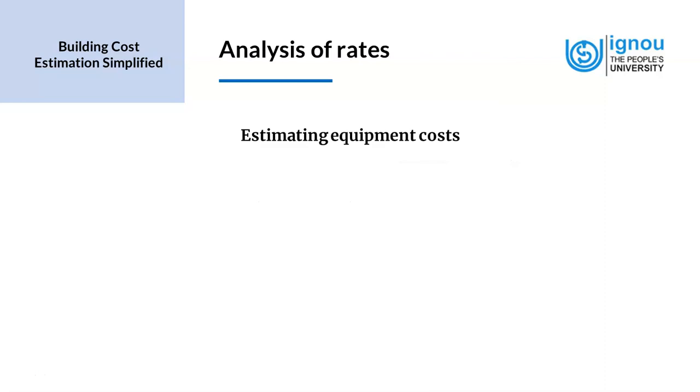Now, how do we estimate the equipment costs? It depends on the equipment size. We may have to book in advance for getting a particular equipment on the site. And when it comes to tower cranes, factors like what capacity does it lift and how long does it need to be on the site, etc., are crucial to the cost.